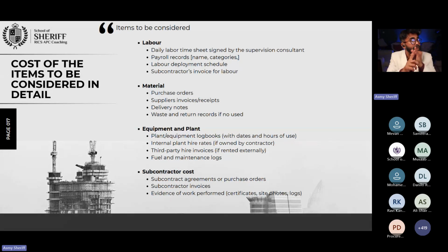So ensure that you have a very clear purchase order and very clear supplier invoices, and make sure that all the quantities were delivered to the project. And this project's people, supervisors or whoever, accepted and signed. They mentioned that, yes, we checked that there are 103 items. They stamp. And ensure that they already recorded waste or maybe any returned item.